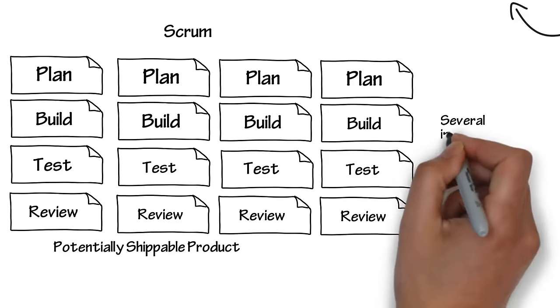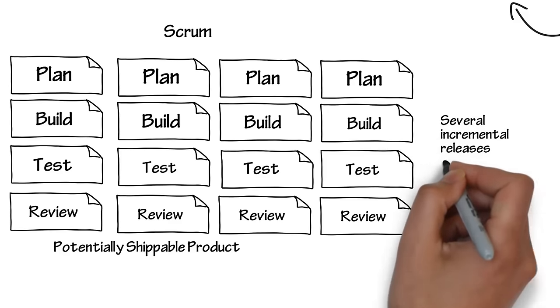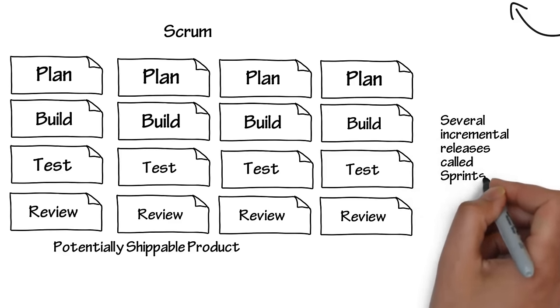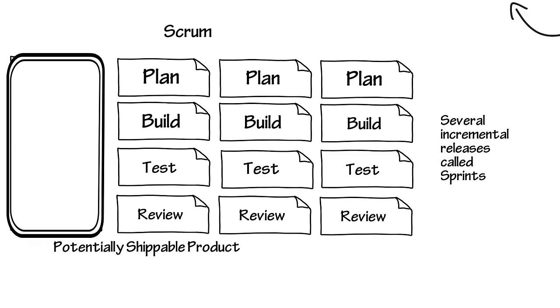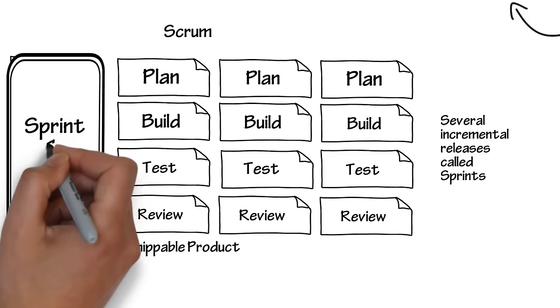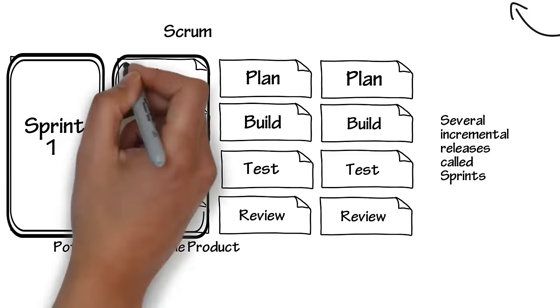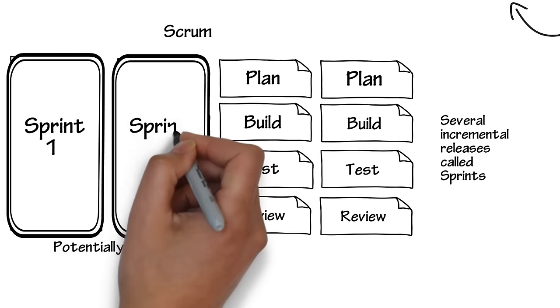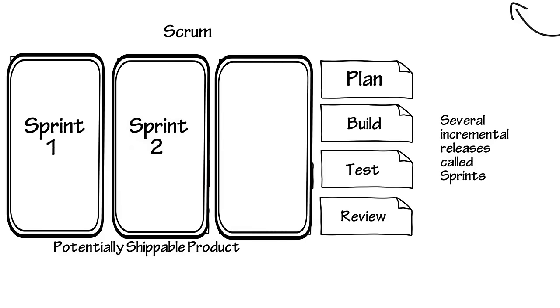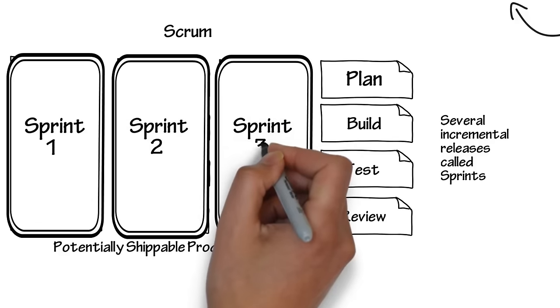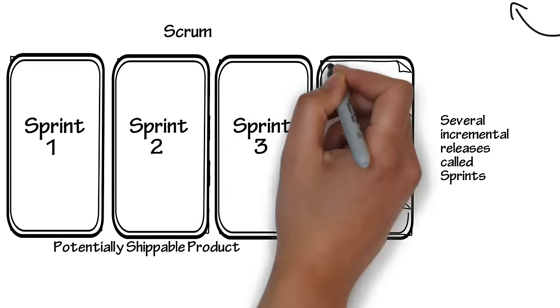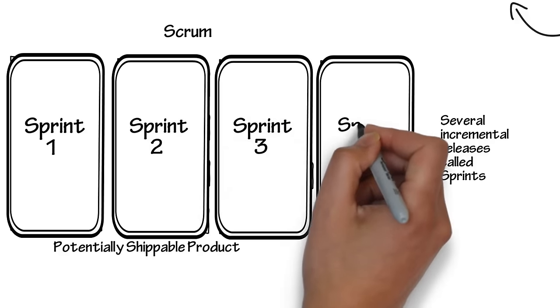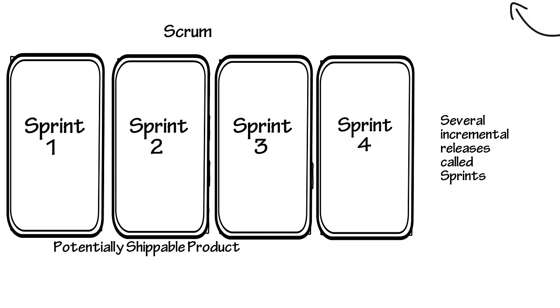You end up with several incremental releases called sprints. A sprint usually takes from one to three weeks, and you just keep repeating these sprints until your product is feature complete. Sometimes you may end up shipping your product after the second sprint, or the third, or the fourth, or even further. But you eventually end up with a shipping product.